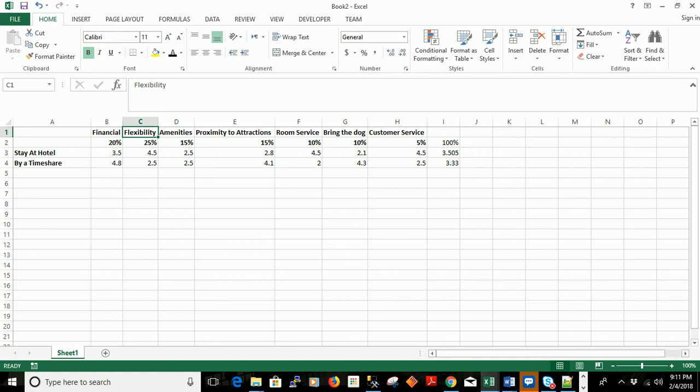I don't know if we talked about RFPs or requests for proposals, but sometimes it's important to do this to reduce your liability when you're doing a request for proposal, because all these responses that you get, you can rank them this way. That way you can defend your decision to purchase from one vendor versus another. That could be because, if you're a publicly traded company or something like that, they may have access to your decision process, and they may make the case that you were skewed towards another vendor for unethical reasons, such as kickbacks and pay for play and things like that.